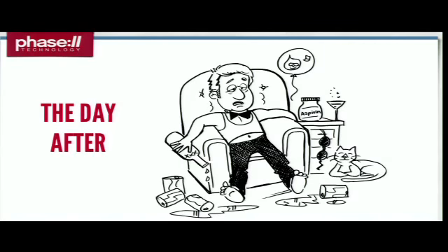Maybe it's 2 days, maybe it's a week, 2 weeks, 2 months. But what happens immediately after launch is just as important as immediately prior to launch, because that's when those content editors we were talking about are actually using the system for real. And that's also when they're going to discover the 25 things they never understood about the training process. It's when all those traffic patterns that we talked about are going to start to become apparent. It's when the CEO finally looks at the website that you've asked him to review 10 times prior to going live. You know, he looks at it that weekend on his iPad and goes, oh, this thing doesn't look right, or whatever.